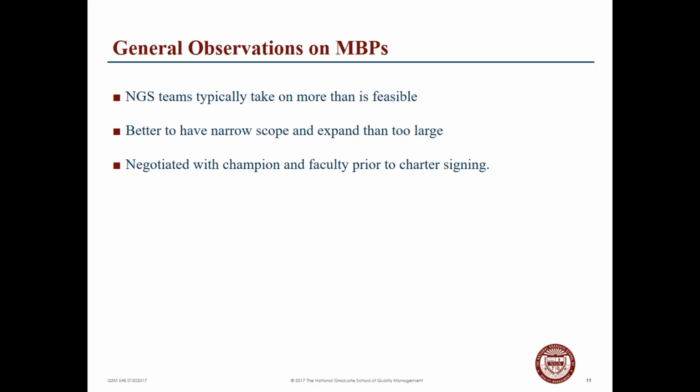What you're looking for is, you may be seeking to make a huge change in your organization. Better to look at it from a perspective of, hey, maybe this change is a good idea, but let me take it to the point, particularly for this project, from a pilot perspective. So instead of doing a division-wide or a system-wide approach, maybe I want to look at a department level or a smaller bite of this, so that I can work out the bugs and be successful at the pilot level, and then additional ideations will be able to move that forward.